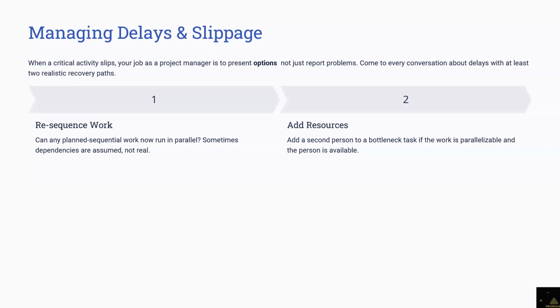So you are not just speaking with emotions or vaguely. You are showing them this is going to require more resources, 10 additional resources, and they're going to be working overtime. You have to show the calculations plainly to them. And this is what the cost is going to be for a project like that.